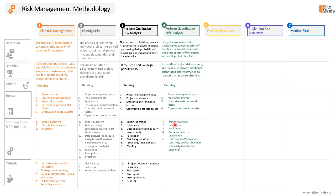The tools and techniques for quantitative risk analysis include expert judgment, conducting interviews, doing facilitation for decisions, representation of uncertainty, and data analysis techniques like simulation, sensitivity analysis, decision tree analysis, and influence diagrams. The most important technique is simulation using Monte Carlo simulation software. The outputs of this process will be updates to the risk report showing the combined effect of the key project risks on the project objectives.